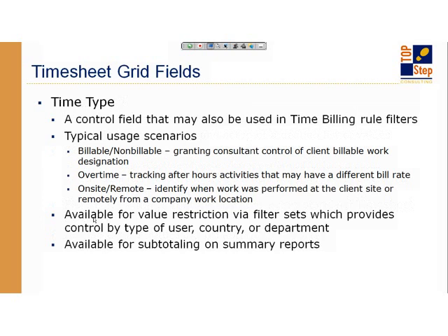When you do that, you're giving the consultant control to identify whether something is billable or non-billable. So really what that comes down to is a decision of, does the consultant have control, or do we handle it through something like task type when we're dealing with the project, to let the project manager have control? And of course, if you're putting something on a timesheet, you also want to have it be part of the review and approval process. But time type, billable, non-billable, is quite often used.